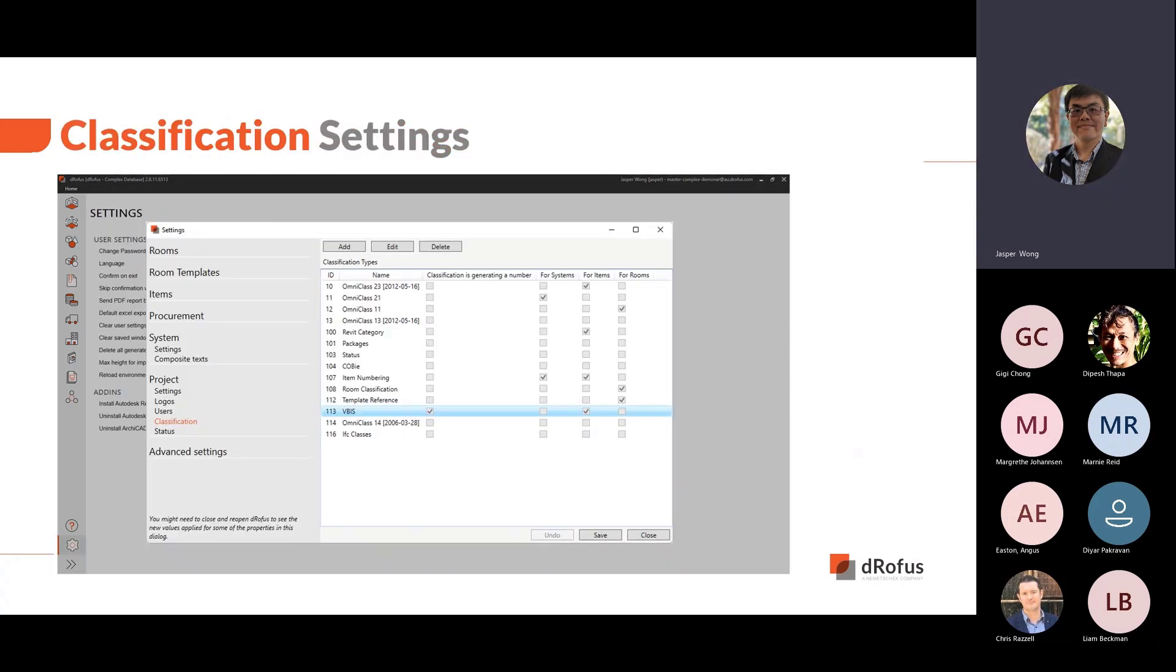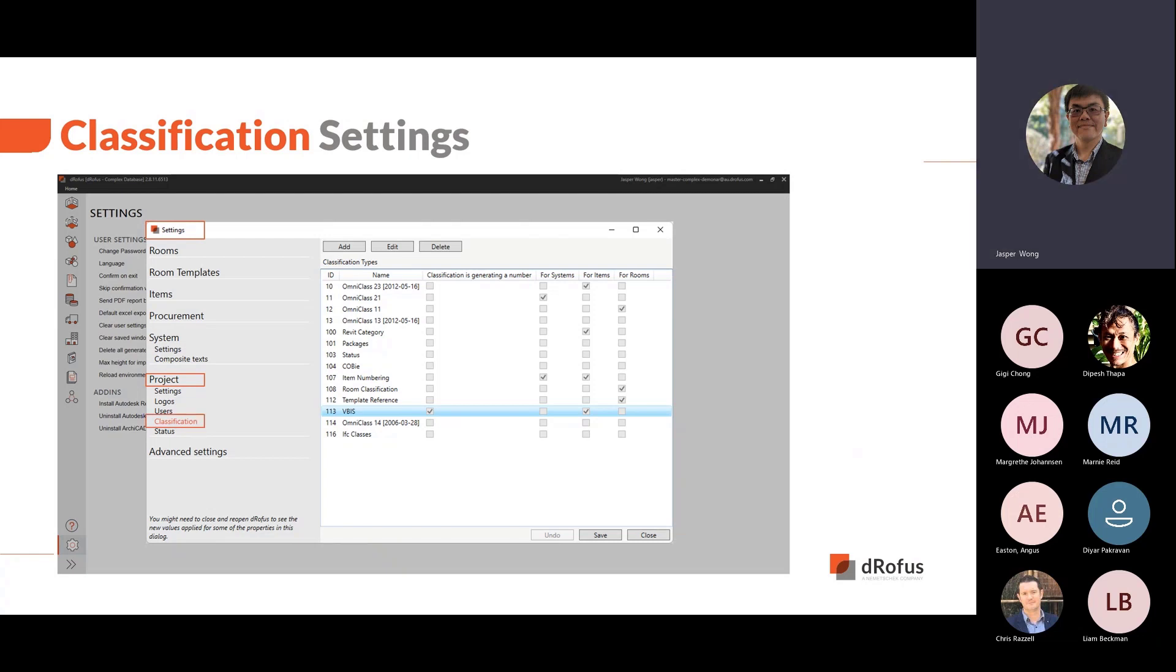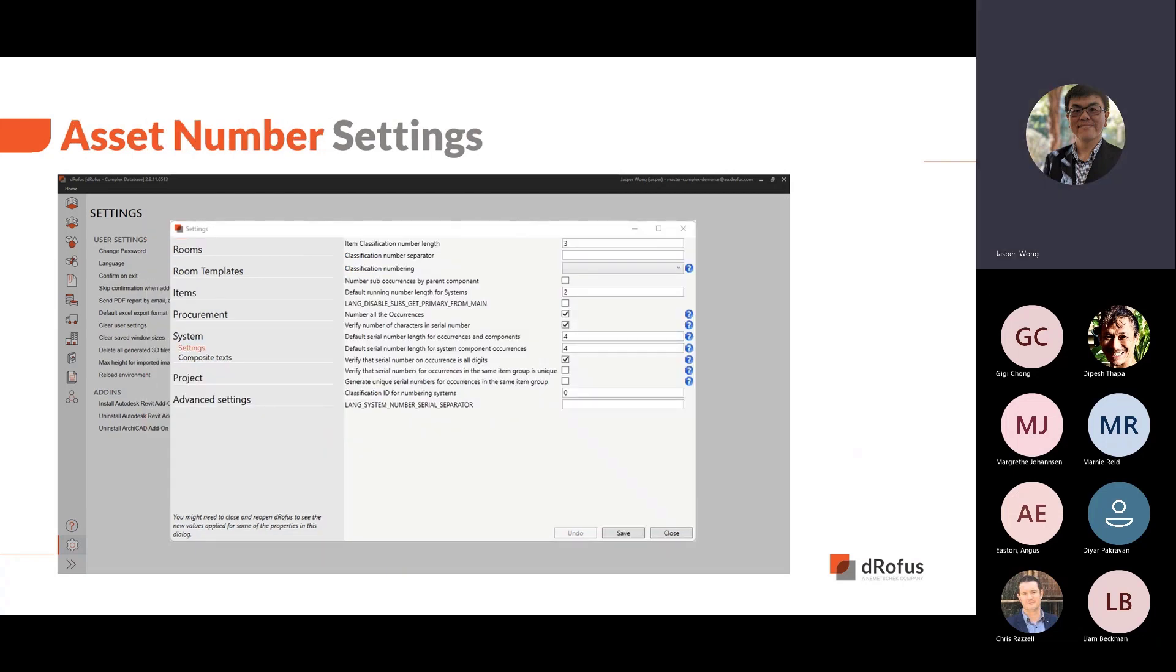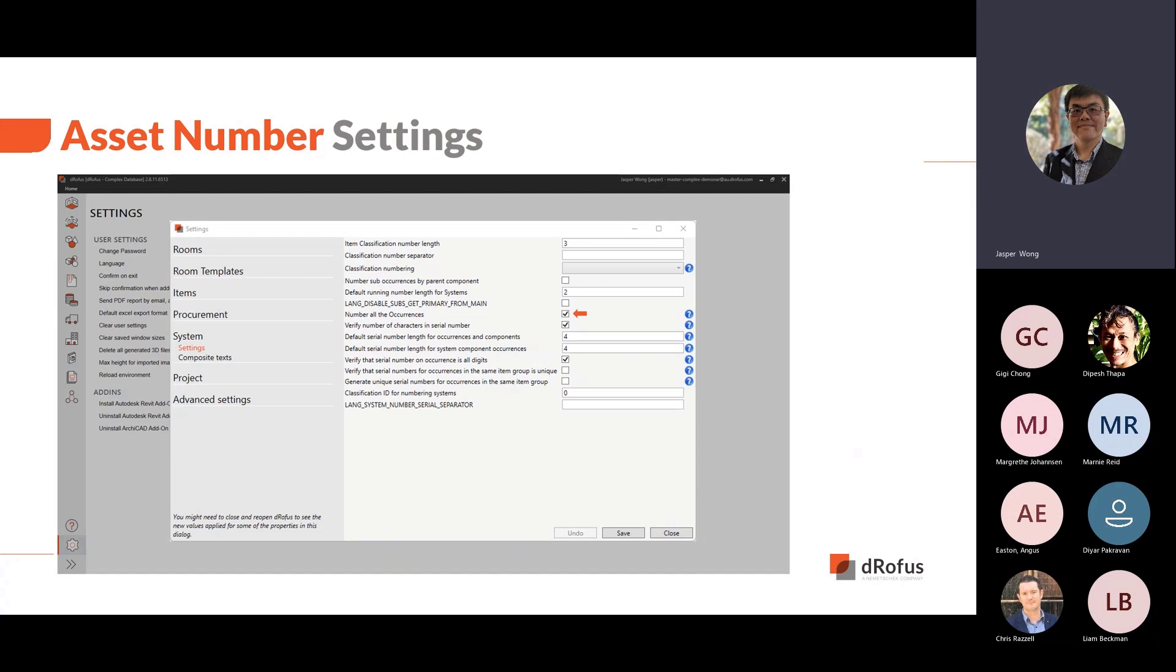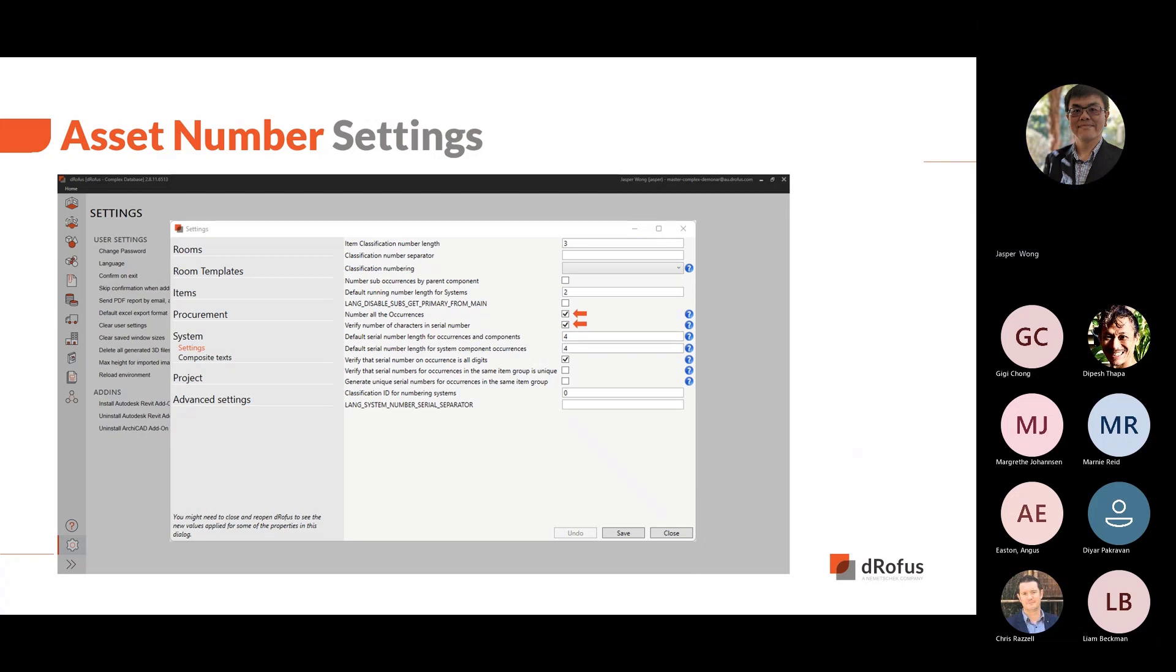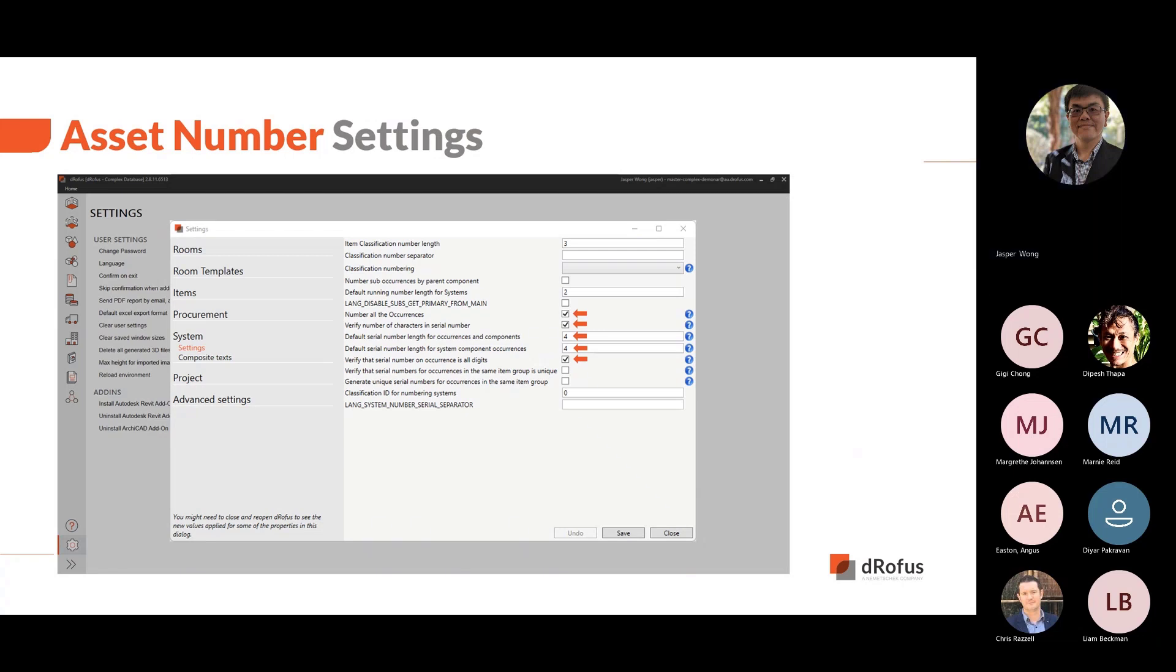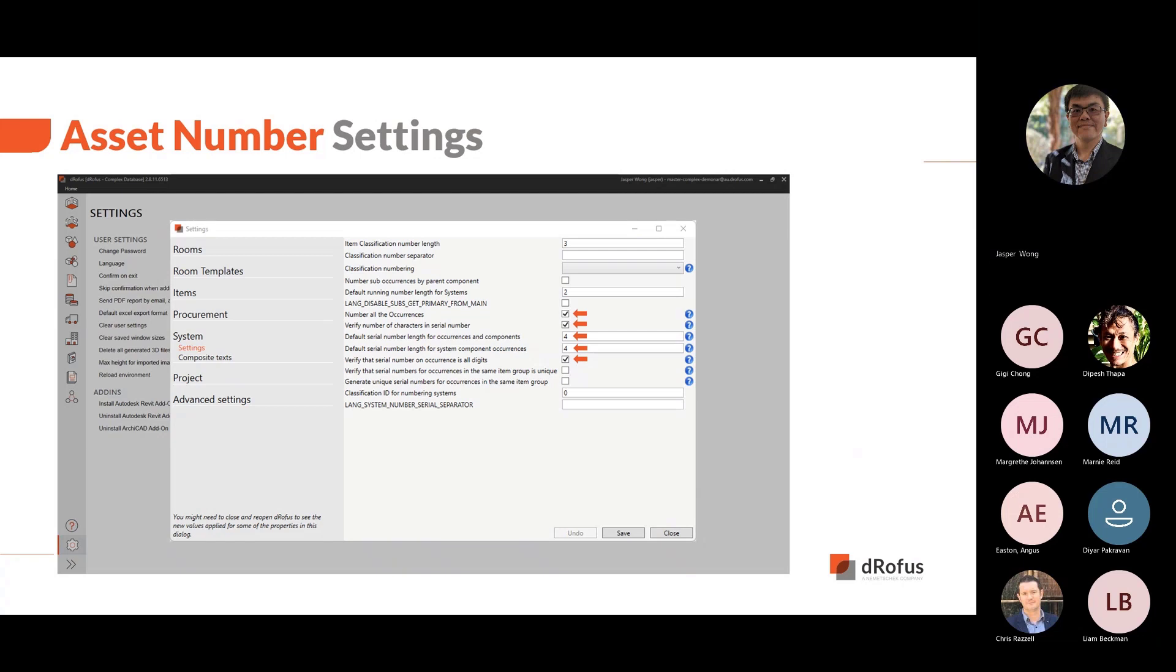To create the unique numbers, there are some settings required. The first is to set up ensuring that VBIS codes is generating a number. Within settings, project, classification, we will set the VBIS classification for items and also set the classification to generate a number. Next is to set the occurrence numbering and we do this in the system settings with the following. Set to number all occurrences. Select verify number of characters in serial number to check for the length of serial number when modifying occurrences. Set the number of characters in serial number for new occurrences and new system components. And lastly, check that all serial numbers are numeric. With this settings completed, we can now look at what asset numbering looks like.